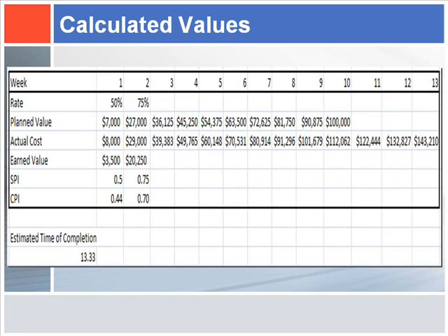After all calculations have been made, here we find that the project will run over by $43,210 and will run over the projected time as exhibited in week 13. Clarifying the data further, by calculating the estimated time of completion, we have arrived at 13.33 days, or in other words, 13 days and about a half a day or so.